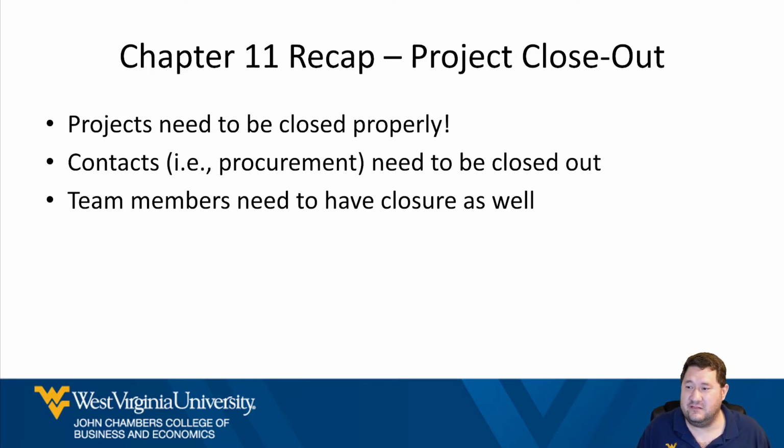Contracts, the procurement contracts mainly, need to be closed out. You need to make sure that they're paid, that everything is done, or it's handed over to the procurement department to finish out. Don't just let them hang out there, because that can cause all sorts of problems.